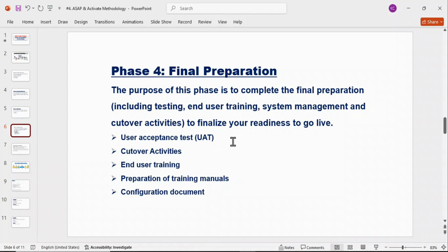So generally what happens during testing, once the testing is completed, a document will be prepared for this UAT, and we need to take the sign off. Or else mostly what is happening nowadays, documents are not required. Simply on email we can get the confirmations. So that is also a document only. A kind of proof is there that yes, you have accepted on so and so date and you have replied. So UAT means user acceptance test.